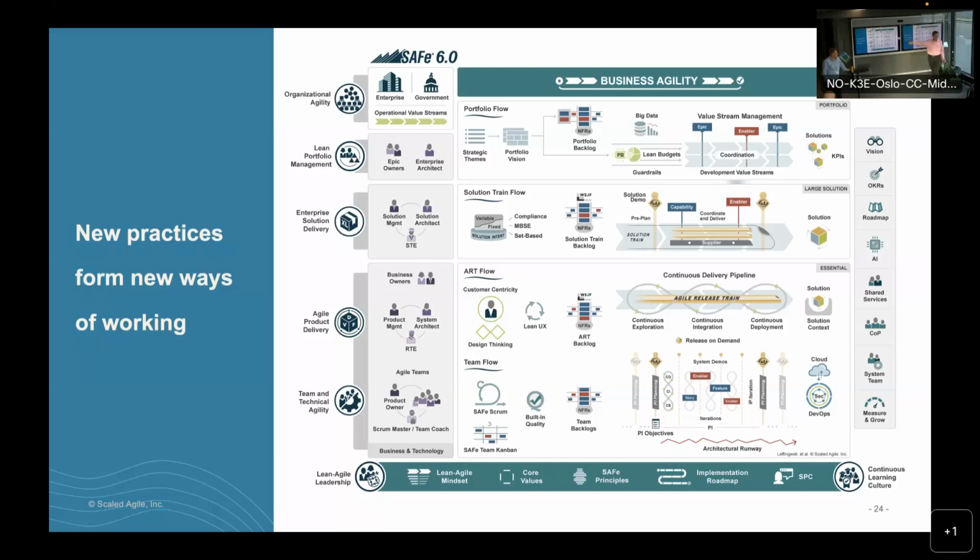Of course, when I present, everything went fine. When we were speaking about one of the coaches, Ida, I said, one of my PIs I delegated to a professional coach inside DNB. I said she will deliver a wonderful PI. It took 1 week because the readiness of the PI was not there. It should have been postponed. People said no, we don't need to postpone. And then when the business started to present and analyze all of the features, people were not ready. So you started to do the whole job. So we should have postponed it 1 week.